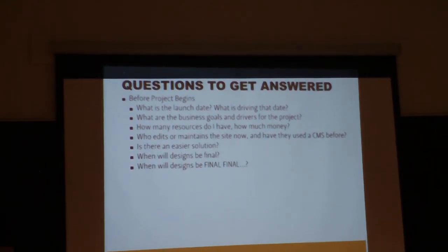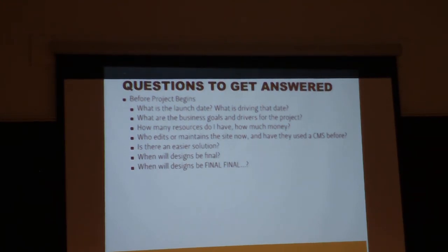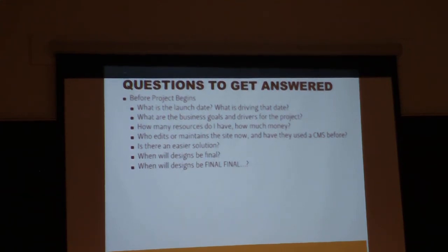And then some of these other questions are, when will design be final? And obviously that date is never, I don't think I've ever hit that date. They've always come back with, can we go a little bit longer with design, so when's it really going to be final? Because with final designs, a lot of these clients or companies can't build off the wireframes because they don't really know what they're going to want until they see the final visual. So that final design date is really important. You can build so much, but until it's actually solidified, that's a date that you have to hit.